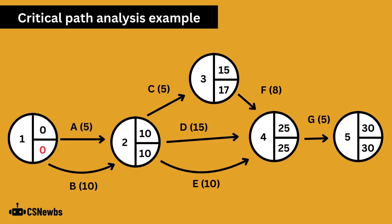And now we're back at the beginning, taking away the 10 days of activity B from node 2 to give us 0. The starting node is always going to have a value of 0 for both the earliest start time and the latest finish time.